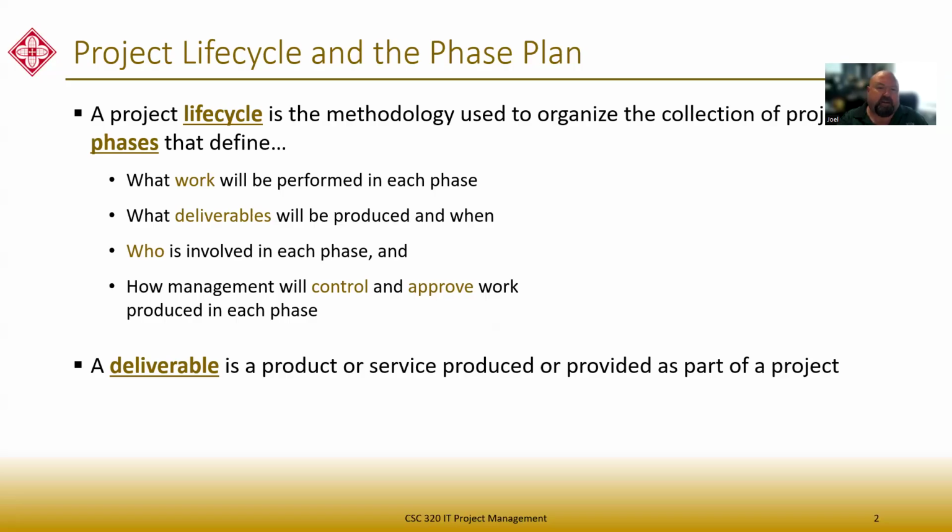I may have phases that include things like quality assurance. And so, what's the work that's done in that particular phase? Well, it would be going over my baseline plans and ensuring that I'm following those plans and am I deviating from my baseline in any particular way, right? So that would be considered the work. So phases have work that's going to be done, something that you're going to actually do.